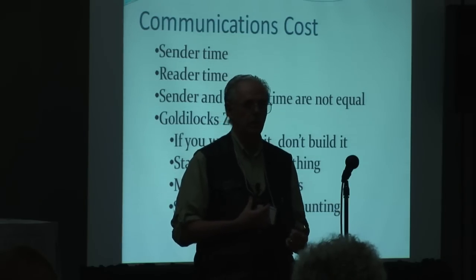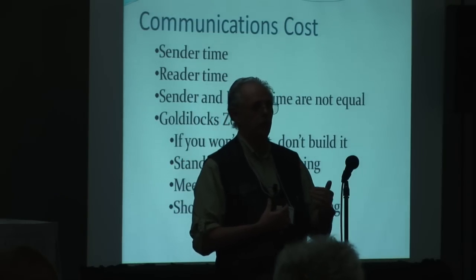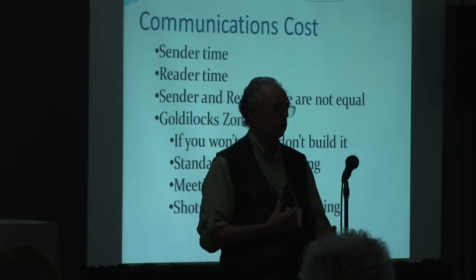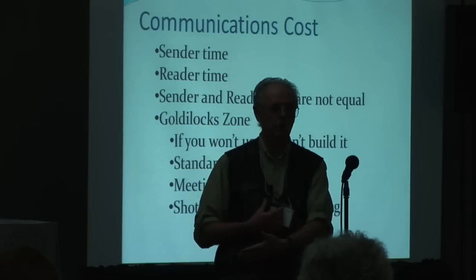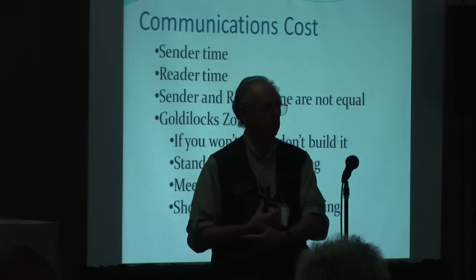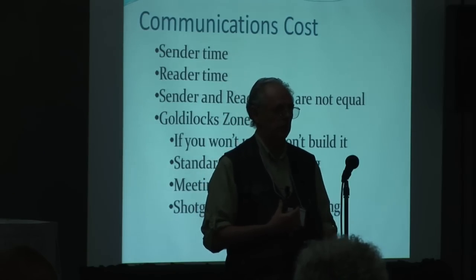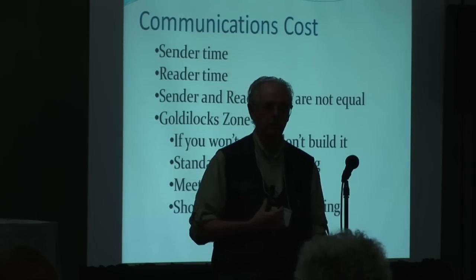Another thing that turned out to be a benefit was that we discovered we had left things out, things that we had missed, when they came up. A project comes through, something goes wrong, and we say, we never covered that in the technical design review. It wasn't in the document. We added it, and the next one that goes out has it in there. So quality control and quality improvement are built right in when you have a standard document like that.